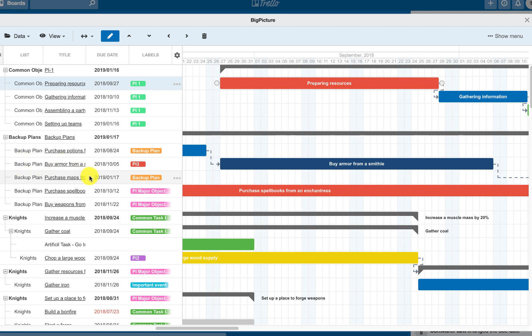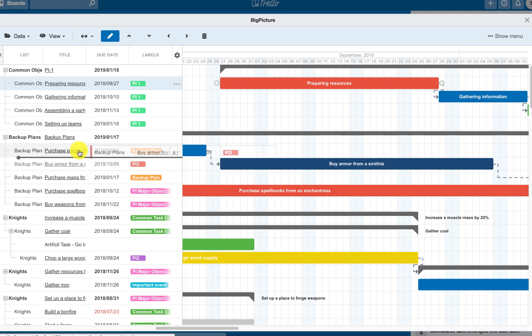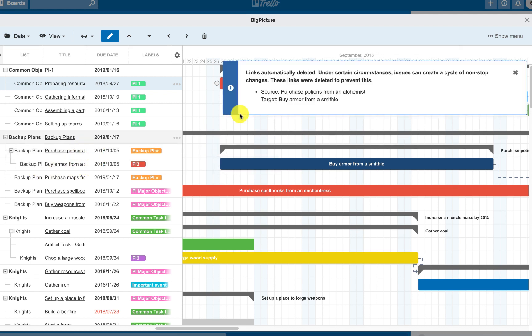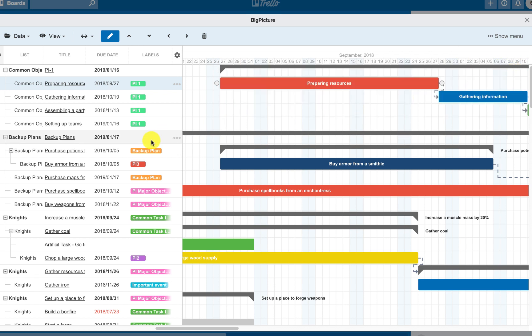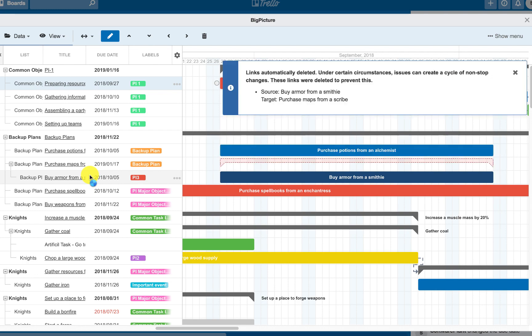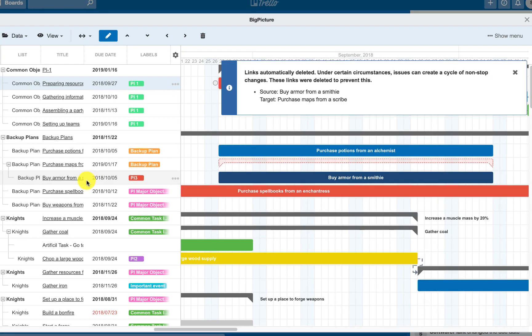The WBS or Work Breakdown structure can be created and modified using the arrows on the navigation bar or by drag and drop. Please note that when creating the parent-child relation, the link dependency between tasks will be removed.